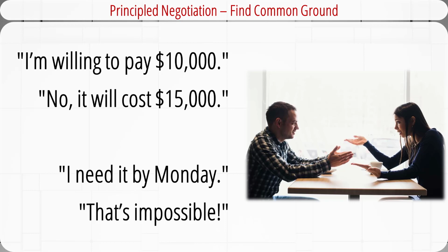For example, the project manager needs the prototypes on Monday to demonstrate to a potential group of customers. The contractor says it's impossible. However, when the project manager reveals that the purpose of the demonstration is to see customers' reactions to the color and shape of the prototypes, not the functions of the finished products, then the conflict between the project manager and the contractor may disappear. The contractor may tell the project manager that the prototypes will be ready early Monday.